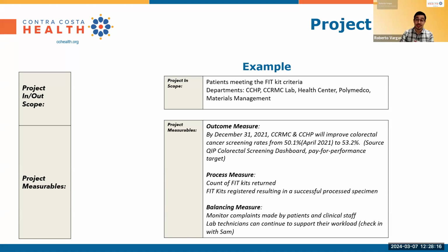Because if we were to start deviating, if we start expanding into that other world, we may dilute our overall energy and capability to make good sustainable change happen. So it's really, really important to put a good quote unquote scope on your project. And it also shares with everybody else, this is what we're doing and this is what we're not doing, especially so there are no missed expectations and interpretations.